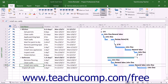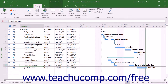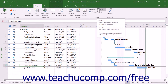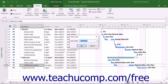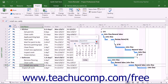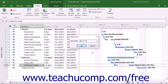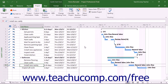In addition, you must select a status date so Microsoft Office Project can compare the baseline values against the values recorded as of the status date. To specify the status date, click the Status Date Calendar button in the Status button group on the Project tab of the ribbon. In the Status Date dialog box that appears, use the calendar dropdown to select the status date or simply type a date into the text box shown. Then click the OK button to set the status date.